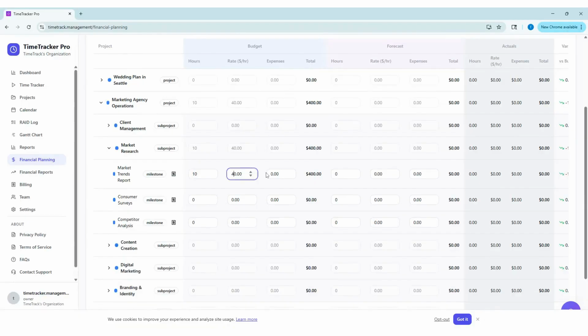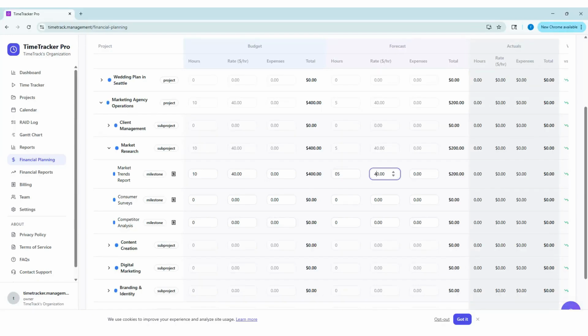The planning is monthly, meaning that you can enter your complete plan for the month and save it to the database. You can then view the totals at the quarterly and the yearly plan levels. The actual numbers are taken automatically from your time entry screen. As and when the resources enter time, these numbers get accumulated against the respective milestone.